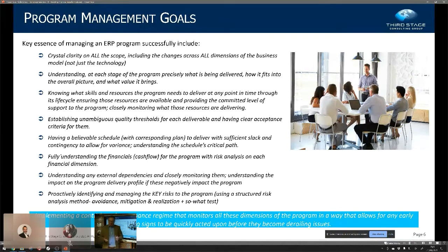Now, I'm a great believer in wet signature, and the reason is because if you are signing something for real, you think about what you are signing. If you are signing something off an email, you'll just say, yeah, it's all right, good enough, and move on. But a wet signature is a level of commitment that goes up. And even in these times, for key artifacts, we circulate the deliverable with an acceptance and get it postage mailed back to make sure that everybody is absolutely happy and comfortable.